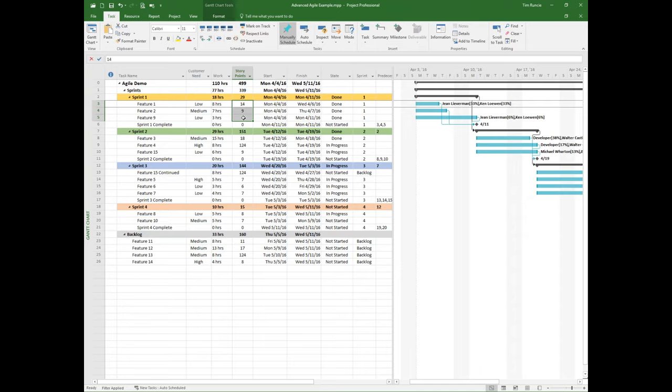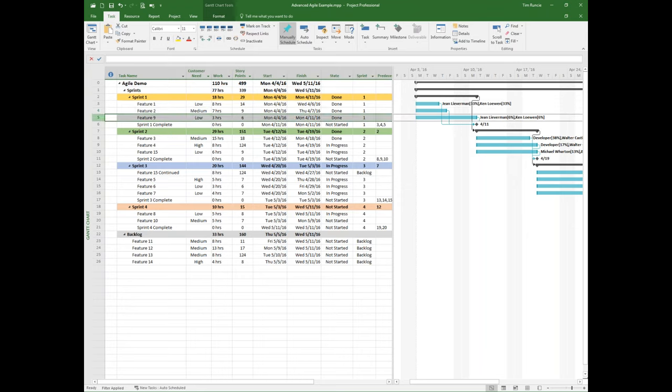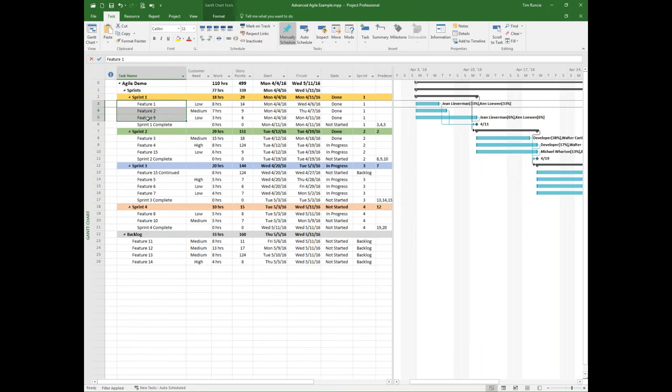So if somebody came to you and said, I need you to build a shed in the backyard. You go, shed. Well, I don't have any skill sets in building. But a shed can't be that hard. It's only going to be five feet wide and five feet high and five feet tall. I don't think the complexity is that different. Whereas somebody might come and say, I need you to build a subdivision. And there's going to be 30 houses. And we have to do permitting. And suddenly you go, whoa, that complexity factor has gone off the charts. Well, the idea of story points is it allows your technical teams the ability to put a weighting factor around either a task or a feature or a user story or whatever level of detail that makes sense.